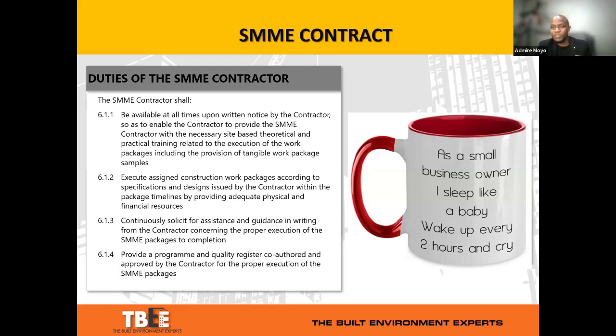And part of that can be done in the form of samples of construction work that the contractor then executes, provision of templates for quality management, or templates that the main contractor uses as part of their own service.